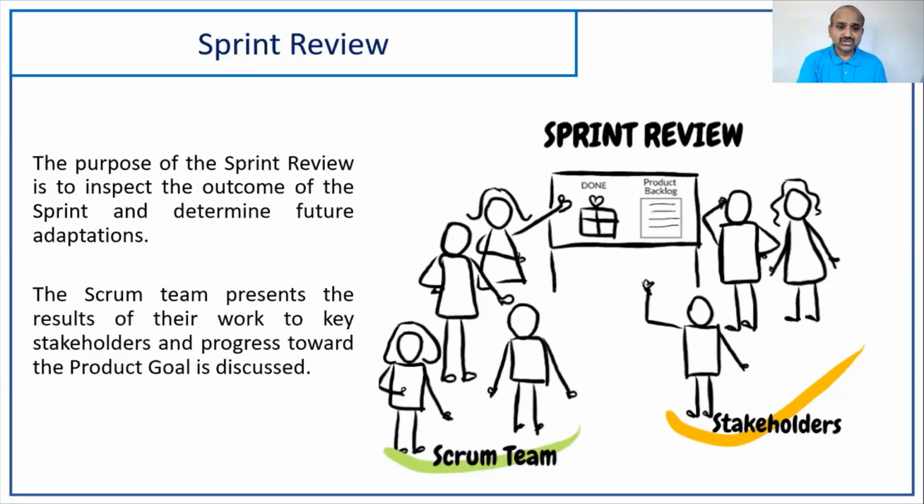So the Scrum Master needs to make sure that the team does a preparatory session, and people understand: story number one, the person presenting is A, and as per our understanding, we have met all the acceptance criteria. So all the story points we are confident of taking back. The second story, partial: out of 6 acceptance criteria, 4 we met, 2 we did not meet. So how do we address that? What is the reason for deviation?